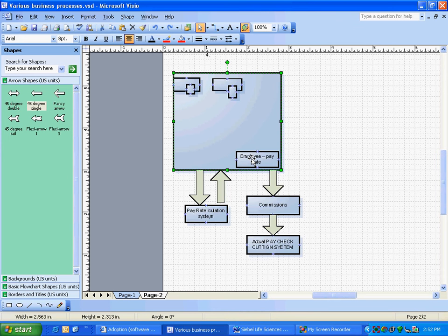So this is a phased implementation, because on April 21st we are rolling out a system. So why don't we combine the effort and do half of the requirement now itself? Then we only have to implement the rest of the requirement in June. So this is project management.